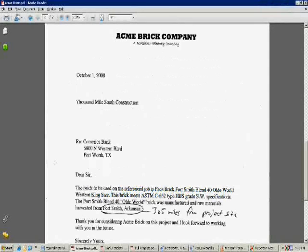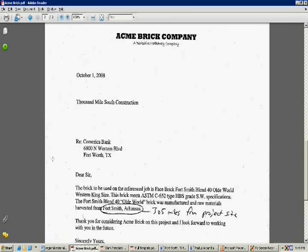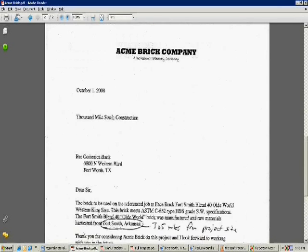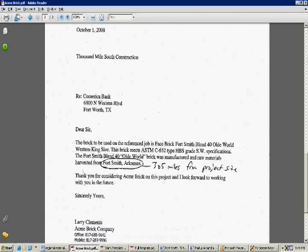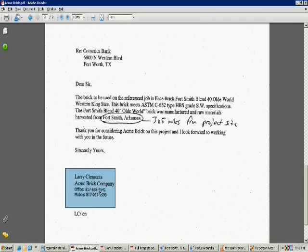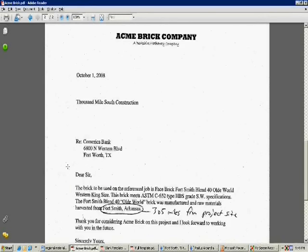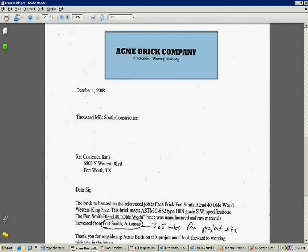Here's an example of a piece of documentation for one of our material suppliers stating where the material he provided for this project was manufactured and where the raw material for the product was harvested. In this example, Acme Brick provided their Fort Smith 40 Old World Brick and it was manufactured and harvested in Fort Smith, Arkansas. It's important that the material supplier put this on his company letterhead and that they provide their contact information.